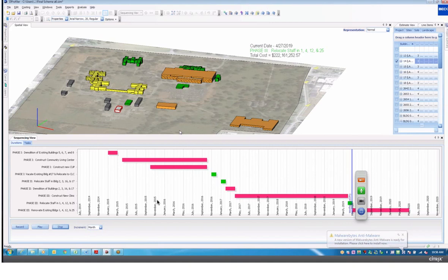One thing that's very important in a situation like this is to figure out swing space. Where are those people going to move to? Are they moving off campus? Are you bringing in temporary buildings? How does that work? In this phase proposed by Leo A. Daly, that's one of the unidentified activities, but they do propose that perhaps temporary buildings on the campus would be an option. And then the last activity on this schedule is those buildings being renovated.